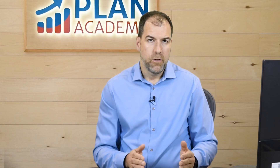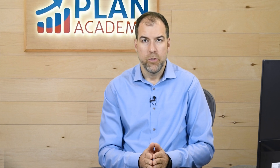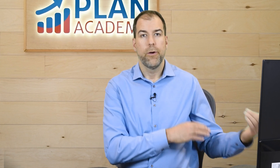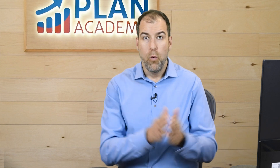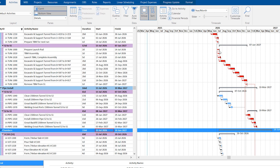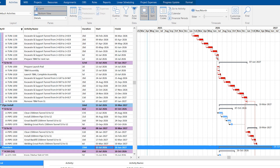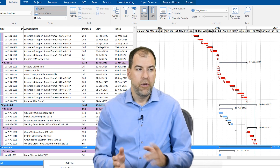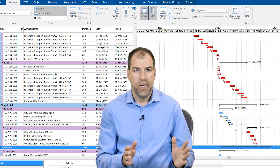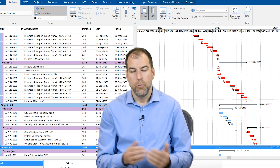If you're managing one part of the project, an important thing to understand is: who are you waiting for, and what work needs to happen before you can start your piece? Also, who might be waiting for you to finish? For example, here we can see tunneling work, and right after that tunneling we can start this section of the pipe install. The previous tunneling work above is happening, and then we can start the first section of the pipe install. You can use the Gantt chart and the relationships to understand the interplay between work across different disciplines.